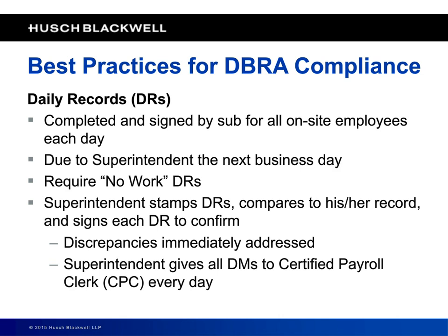Because you would be surprised, if they get behind on their certified payrolls, all of a sudden they're going to say people worked on days where you really didn't see people, or there's going to be a discrepancy between the number of people that show up on this daily record versus show up on the certified payroll. You need to have some sort of way to verify who's there, and you should make the subcontractor submit that form to you.